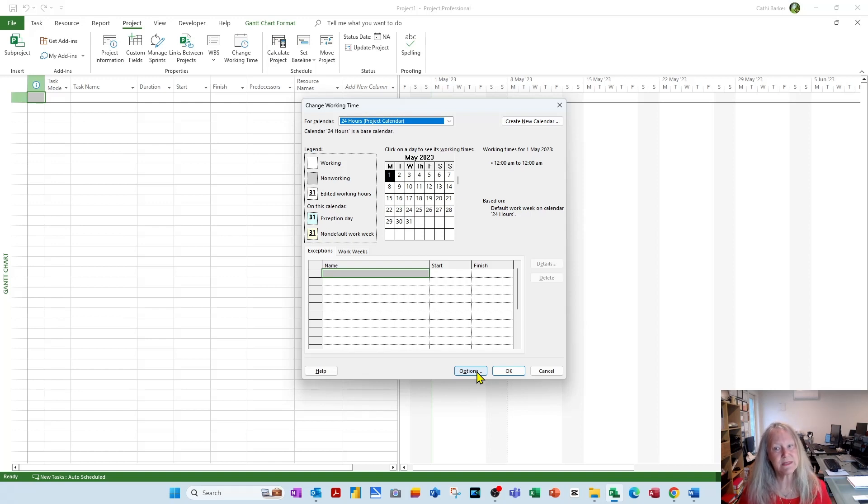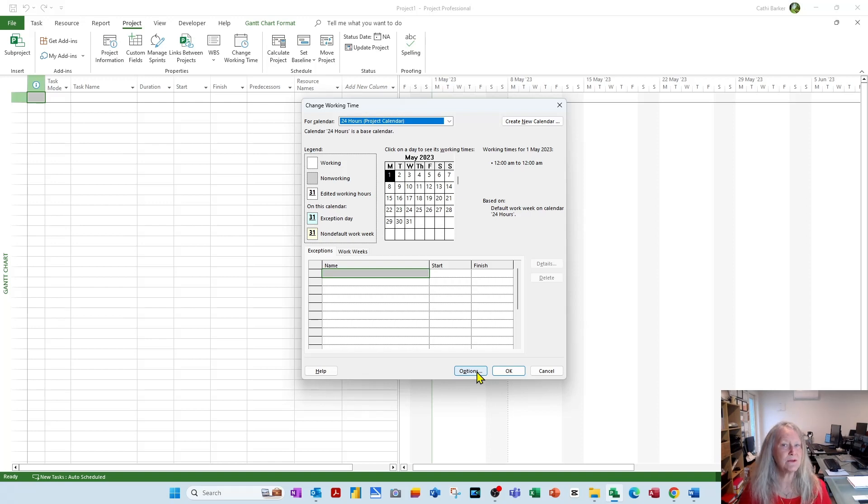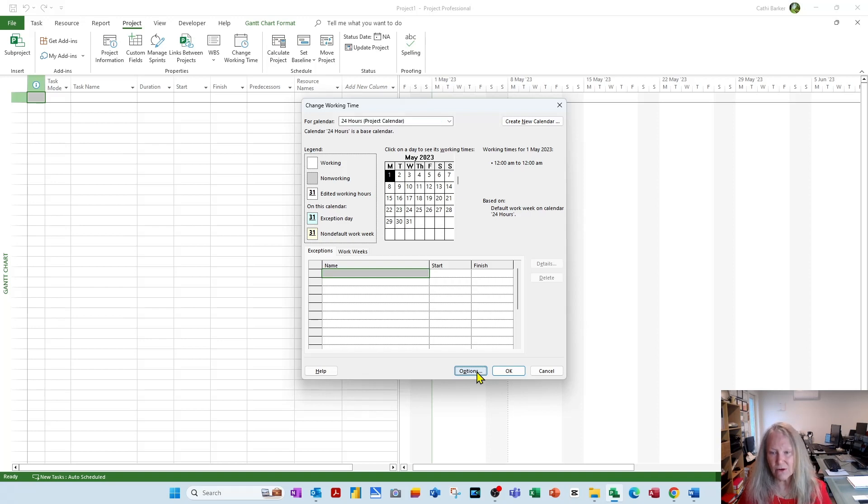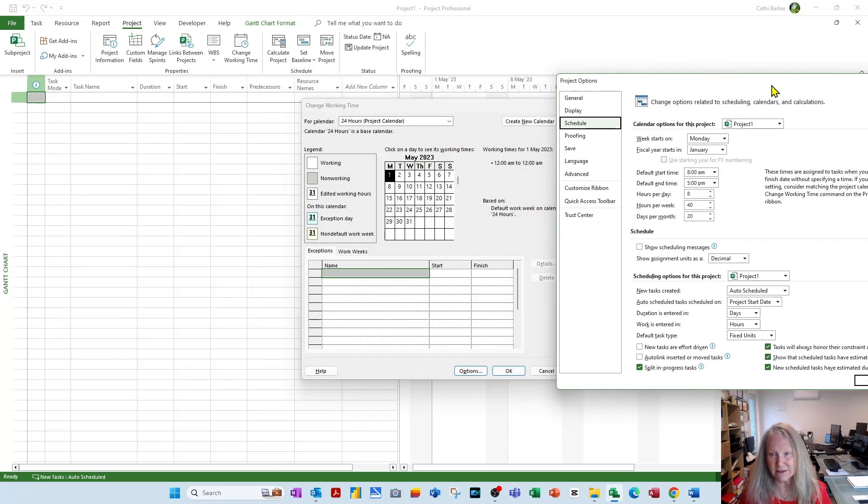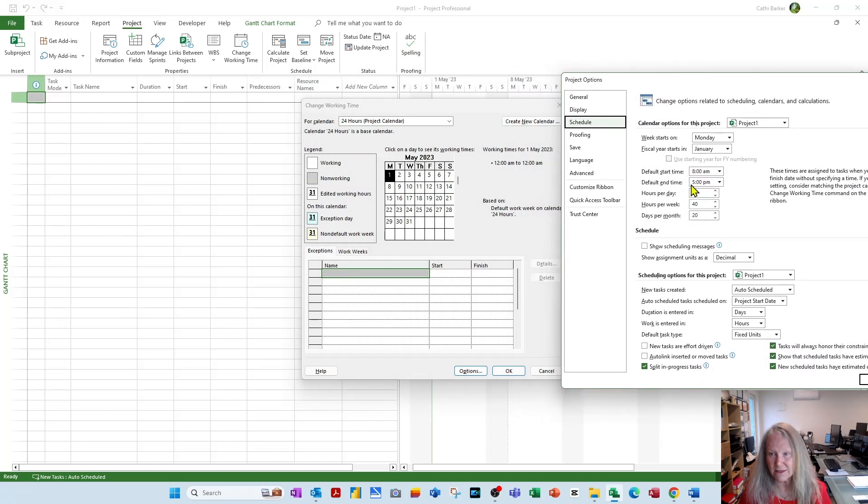And my money is on the fact that they probably don't. So go into Options and fix these settings so that they balance with these settings. Otherwise, Project will ignore these and work with these settings.